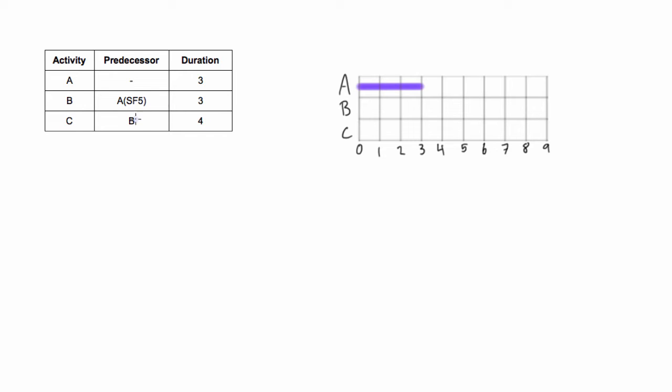Next up we have activity B. Its predecessor is A, but it's a start to finish relationship with a lag of five. That means that B can finish five days after A starts. If it was just a regular start to finish relationship it would just be B can finish when A starts, but that's hardly a realistic thing, so I just put some lag in here for the example.